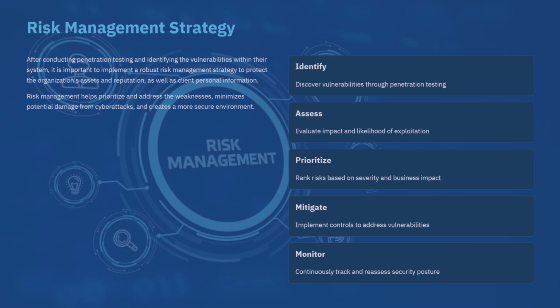The risk management strategy is a 5-step process that begins with identifying risk, where potential threats are determined. Next, analyzing risks to determine their potential impact, followed by evaluating and prioritizing them to focus on higher threats first. The final steps involve implementing risk responses, such as mitigation strategies, and lastly, monitoring and reviewing to ensure risks are controlled and strategies remain effective over time. By developing the risk register, we can help organizations develop a proactive and comprehensive security strategy that anticipates and mitigates potential threats, leading to a more resilient and secure environment.